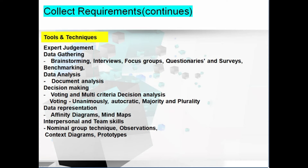Facilitated workshops allow stakeholders to develop user stories as part of workshops for specific requirements. Two types of tools used are Joint Application Design (JAD) and Quality Function Deployment (QFD). Multi-criteria decision analysis uses a decision matrix based on factors such as expected risk levels, time estimates, and cost-benefit estimates. We also have the observation technique, which is similar to job shadowing.